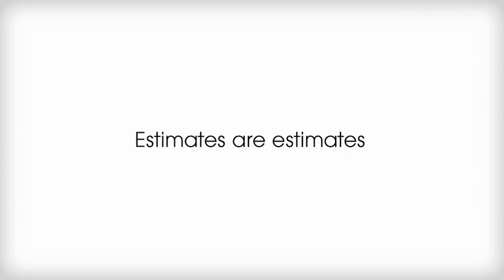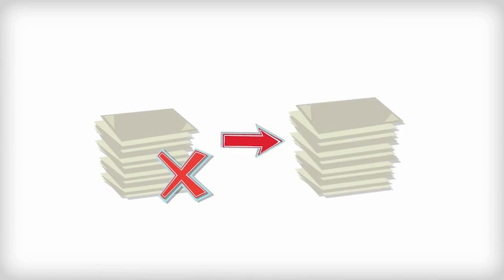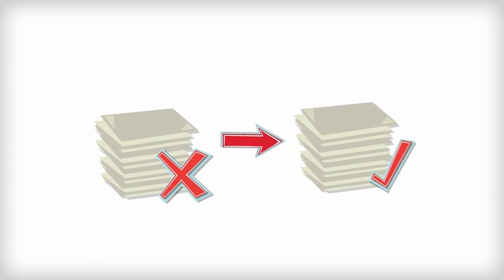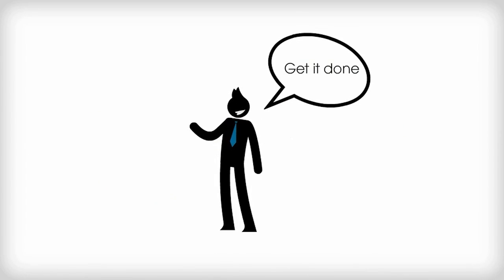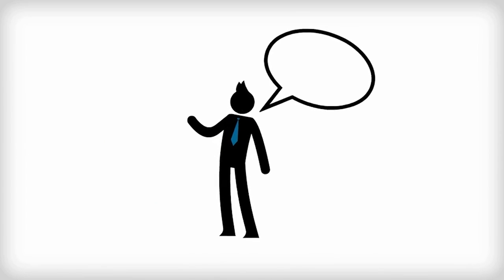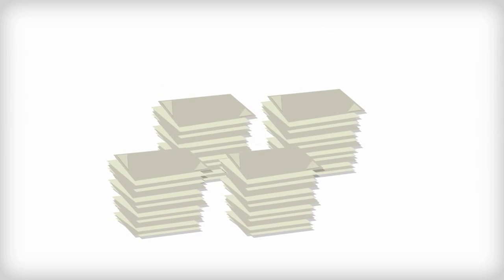However, Scrum accepts that estimates are estimates and by nature are not accurate. It makes provision for any tasks not completed in one sprint to be added to the next or later sprint. Kanban focuses on getting tasks completely done, on completing individual tasks. Applying Kanban reduces the number of items that need to be added to later sprints.